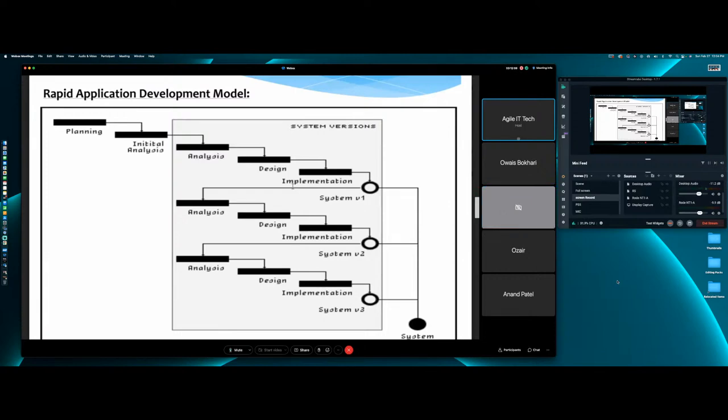The foundation, on our house. If the roofing guy is there on time, but the foundation is not done, what is the roofer going to do? Nothing. He's going to wait. Will the framing begin if the basement and the foundation is not put in? No. Can you build the whole house in a RAD model? No, you cannot, because those things sit on top of each other.